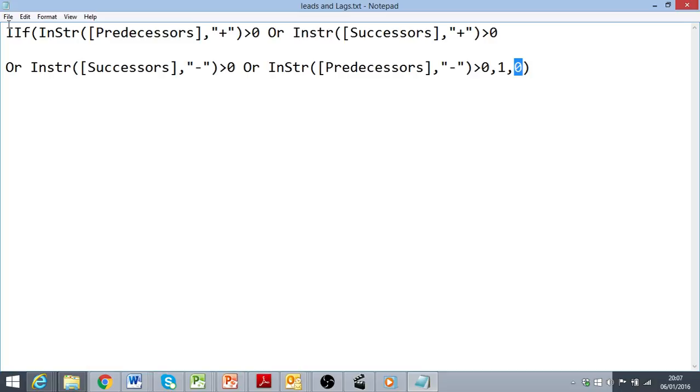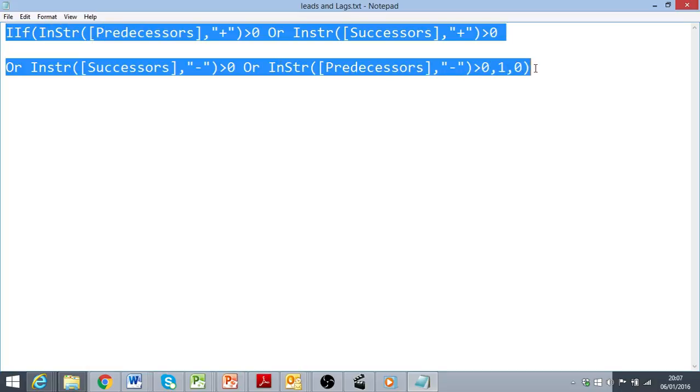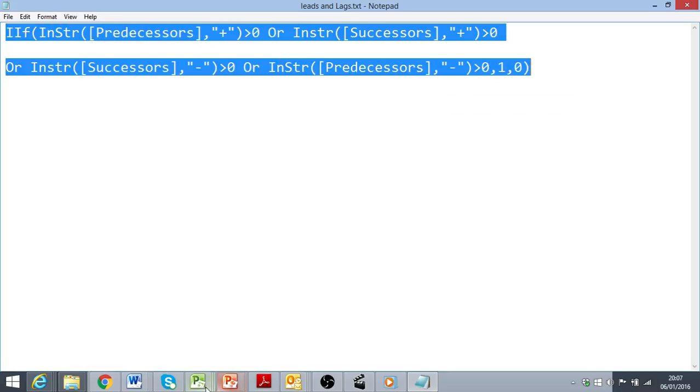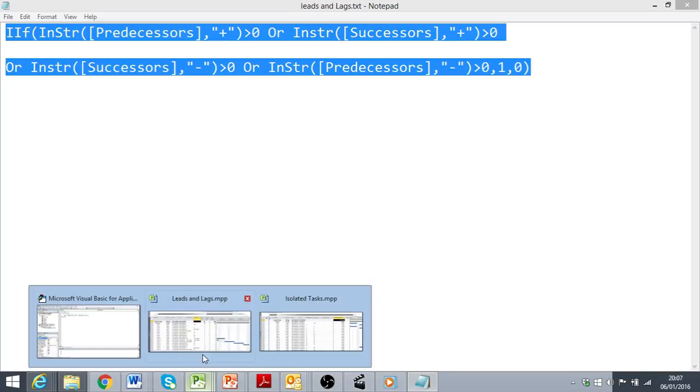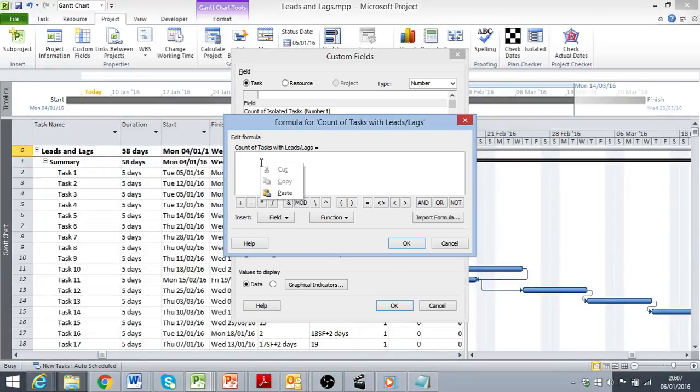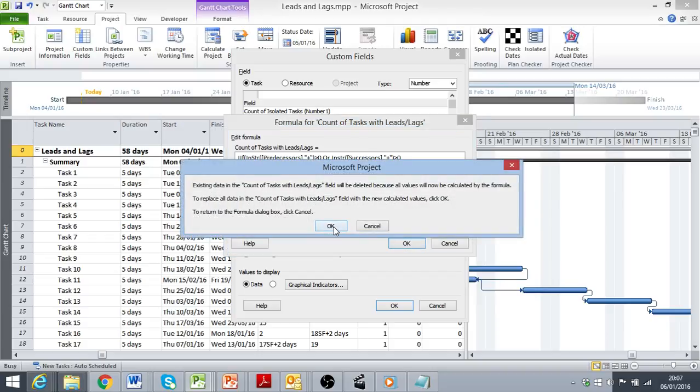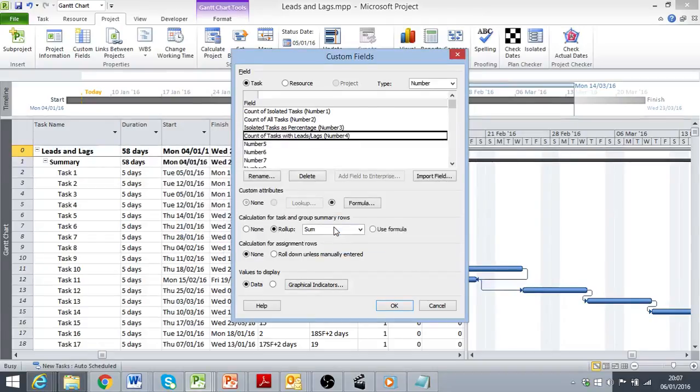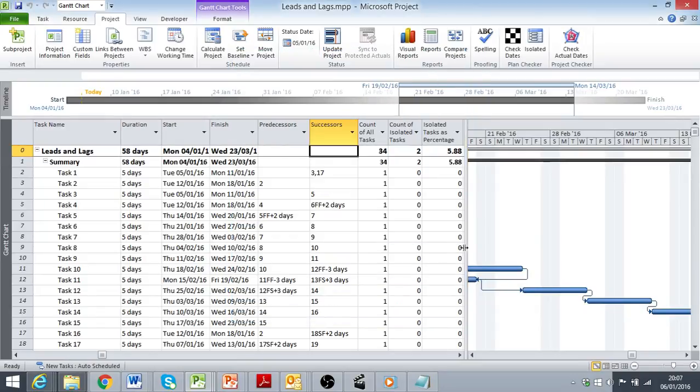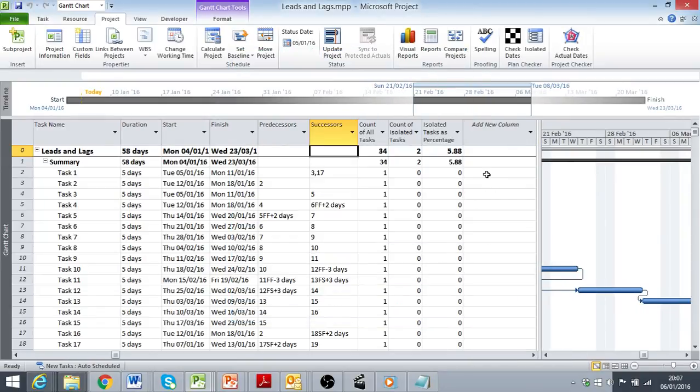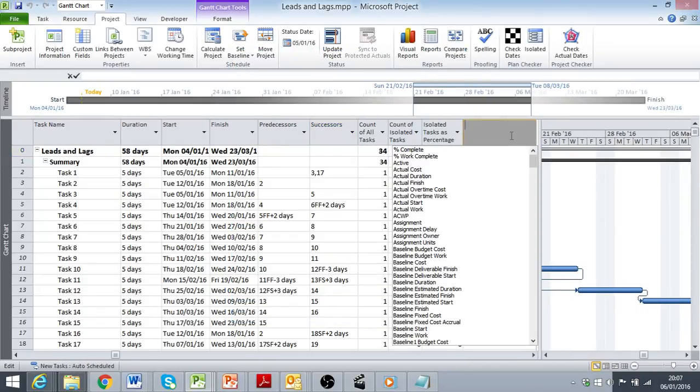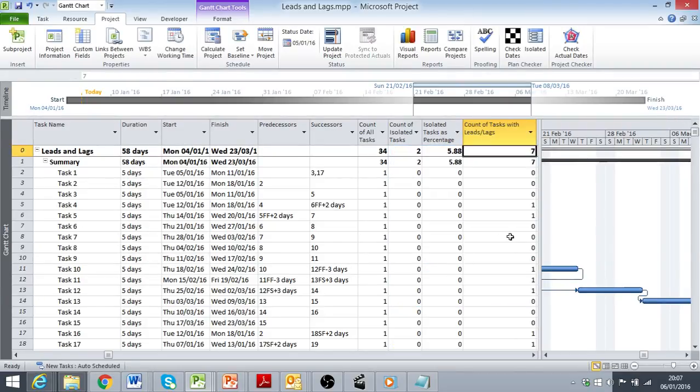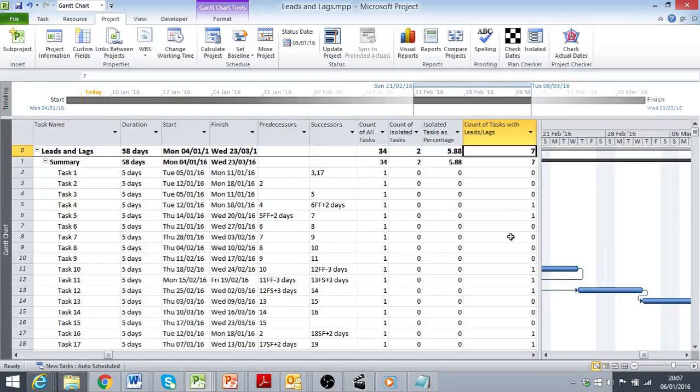So what I'm going to do is copy this formula and paste it in here. OK. And then I need to add number 4 to my table. And this is telling me that I have 7 relationships that use either a positive or negative lead or lag.